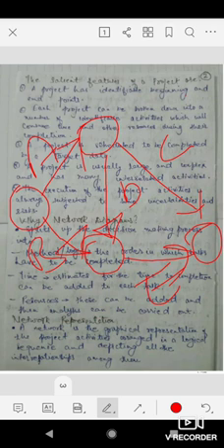For example, C activity will be started only after completing A activity, and you can also see that D activity will only be started after completing A. So both C and D depend on A, but A and B do not depend on any other activity. We can start them at the beginning. E is depending on both D and B.